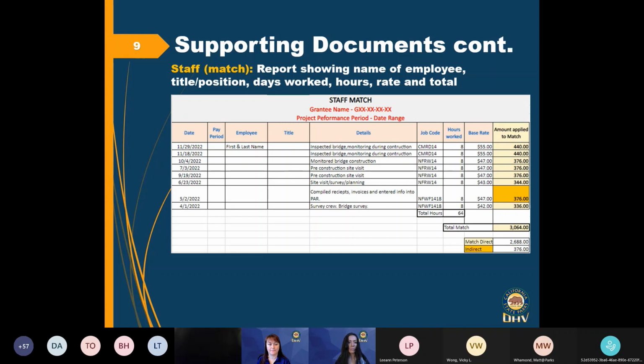Next slide, please. And Maria, yes. What would they need for an audit? So this is all stuff we need for the payment request. What should they have also as backup that they don't submit to us for an audit? Their time card. We don't need that submitted to us, but an auditor would look for your time card. Yes, always keep that in mind. They'll look for signatures and the job codes and that sort of thing on your originating time cards. Next slide, please.